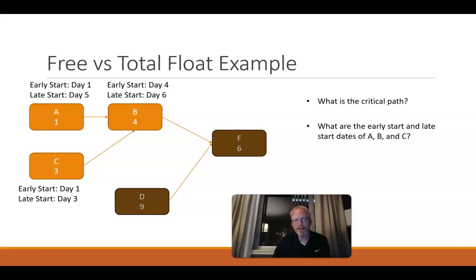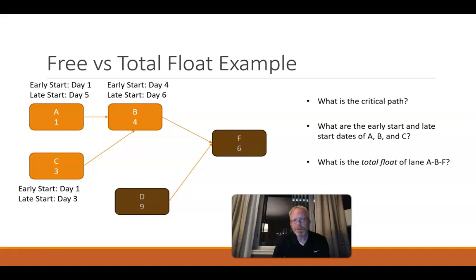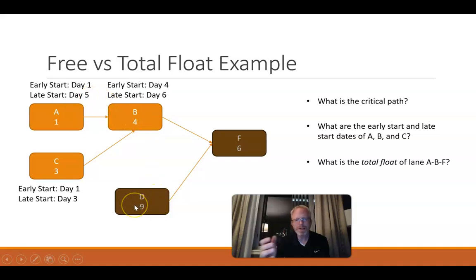Now we have late and early start dates — hopefully we remember those from critical path. What's the total float of lane A-B-F? A and B together is a total of five days, running parallel with D which is nine days. So nine minus five equals four days of total float.